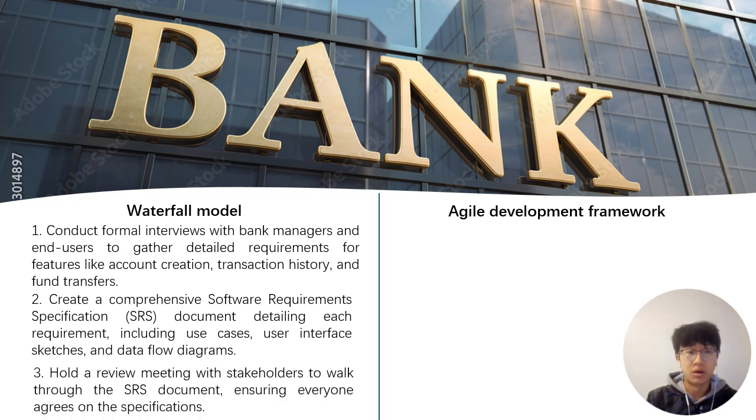The third one, we need to hold a review meeting with stakeholders to walk through the SRS documents, ensuring everyone agrees on the specification. So apart from these three, I think we also need to establish a change control process for any requirements modification, requiring a formal review before being integrated into the project plan.